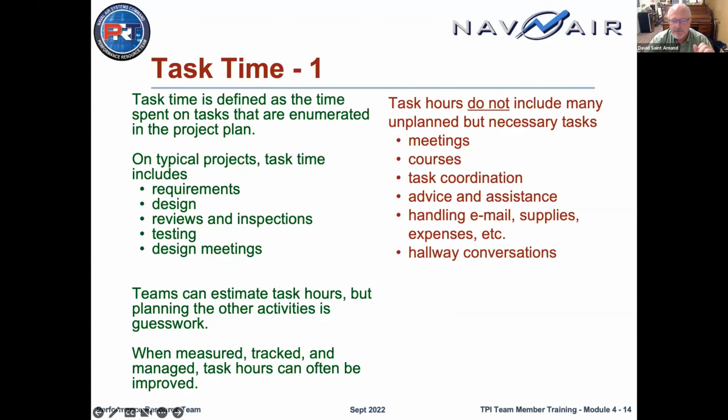We don't normally recommend that people count meetings in their task hours, but there are a couple of cases where counting meetings is important, and that is if management is pulling your development team into status meetings where 20 people are spending an hour each. That can really cut into your work time for the week, and is not necessarily efficient. And if they have more than one of those meetings a week, it can really slow the project down. So in those instances where the team or the team lead feel that they should get some relief from those, maybe send one representative to the management meeting, we then suggest that you record that time so you can report that to management at the end of the work cycle and ask them for relief.